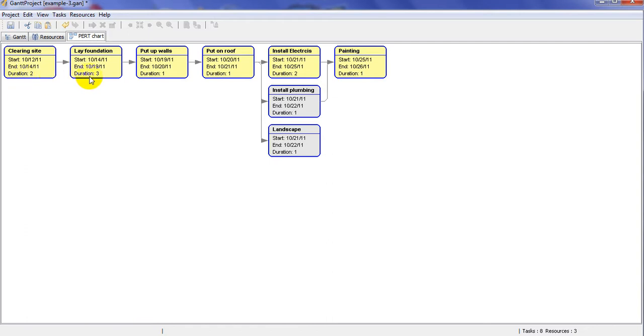You see 2 plus 3 plus 1 plus 1 plus 2. You can add them up here, and this will be how long it takes for the project to be completed. So in this particular case, it's going to be 10 days. And these are the two tasks that we don't need to be too concerned about. You can simply change them here if you want to put it here, or whatever step you want. If you have more complex, obviously you can do that.